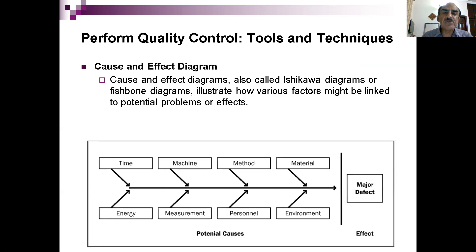One of the tools used for quality control is the cause-and-effect diagram — also called the fishbone diagram or Ishikawa diagram. It shows that major defects may come from material, method, machine, time, energy, measurement, personnel, and environment. We can further break down each category — for example, what can be defects in the material — and in this way we can see the relationship between different inputs or factors which can lead to the major defects.